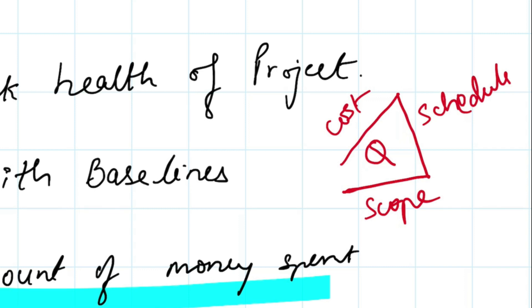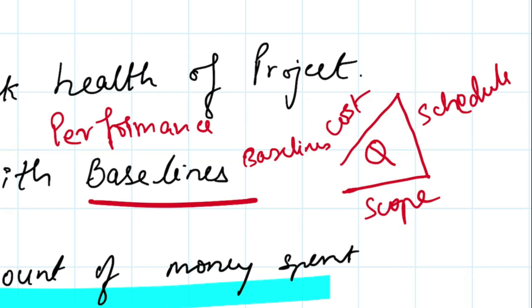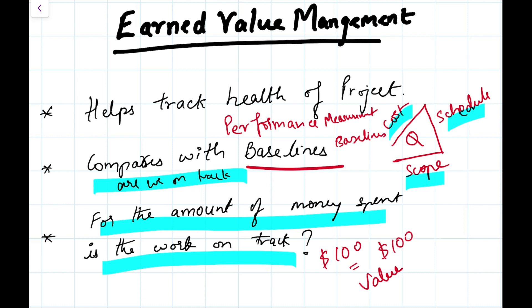When tracking cost, schedule, and scope, we also take care of quality — that's called the triple constraint triangle. What you're tracking against are the baselines. The performance measurement baseline combines the baseline of cost, schedule, and scope. By comparing actuals to these baselines, we ensure that we are on track for project execution.